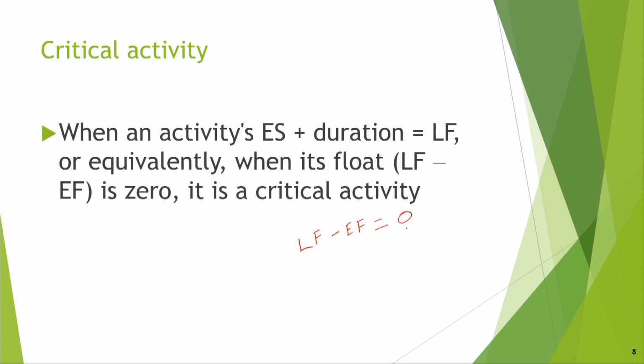You can say LF minus EF is equal to 0, and we know that earliest start plus duration is equal to earliest finish.